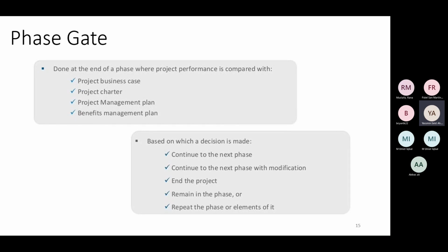So as a part of the phase, that's what I do typically, and these things help me in taking certain decisions. Let's take a very quick example of a project charter or project management plan. You may have put in the project management plan that you would be completing your requirements gathering, with a start date and an end date, and what you will get as the output is the requirement specification document.